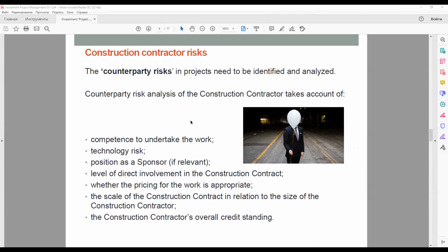So this can be the case in some state procurement tenders where you're bidding for some state contract, you receive it, you take the major part of the profit and subcontract the rest to other companies, and that leads to a situation where you have loose control on the activities performed by subcontractors, and again the quality of these subcontractors will be lower by default, because given this economic situation where the general contractor takes the majority of the profit, it will definitely lead to lower quality of the subcontractors.